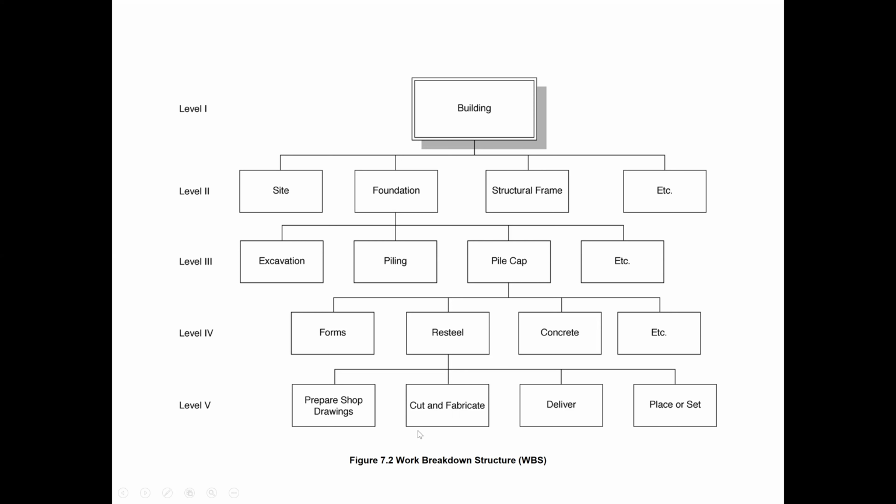Okay, so different levels are given. They want to explain how we are going to make the work breakdown structure. Okay, so these are all building blocks. If we want to bring a subcontractor for doing this work, just for the pile cap, we know how much the cost should be for making this pile cap, and then we can sublet this part of the work.